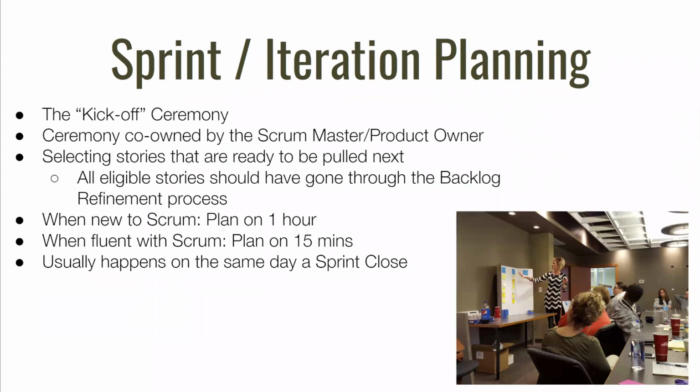When you think about this, this is the kickoff ceremony. This is how you start your sprint, and this is what you're going to be doing first thing out of the gate. The ceremony, we're going to talk about this in closing and opening ceremonies in the next section, but the ceremony is co-owned by the Scrum Master and the product owner. You're selecting those stories that are ready to be pulled next. All eligible stories should have gone through the backlog refinement process.